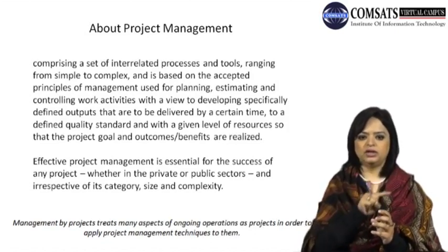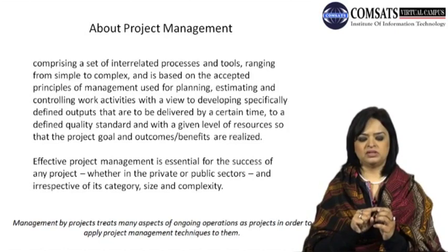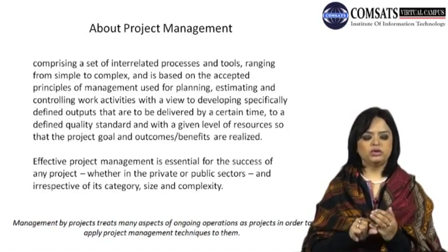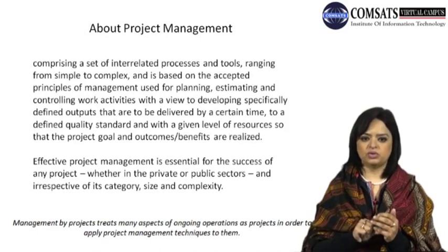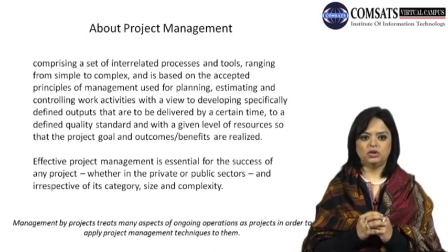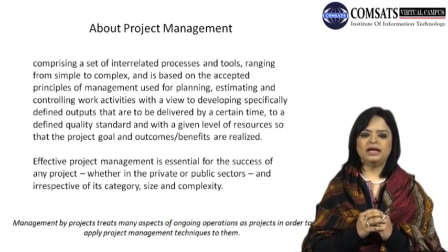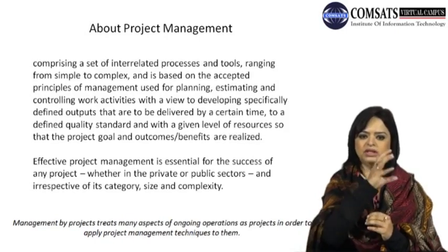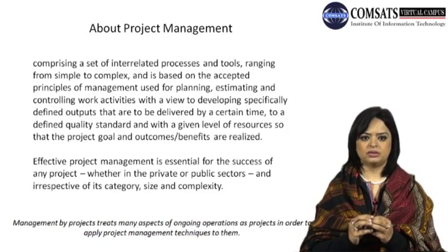So there could be a dotted line between the initiation phase and the closure phase. And the closure phase would include closing out of some of the resources, the laptops, the desktops, the phones, or any human resource that were actually brought in to support you with your project. So that is probably the only situation where you can go from the initiation to the closure phase.